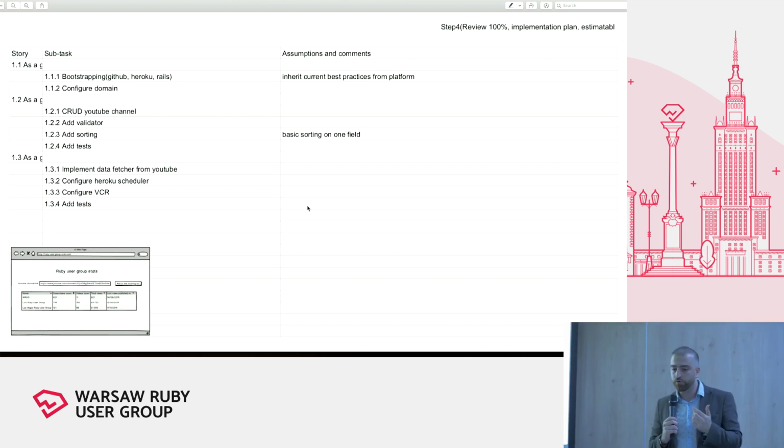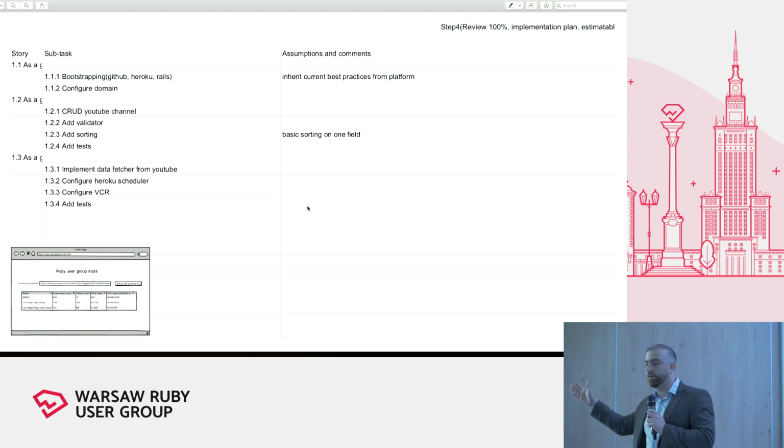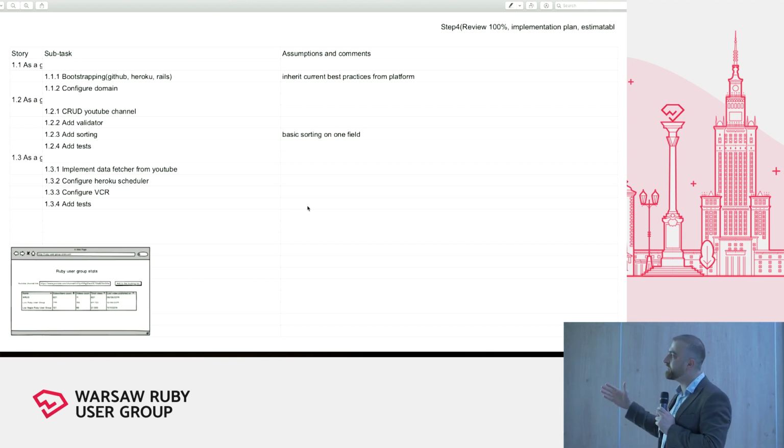And here you need to ask a question to yourself, are all tasks in here? Are there any other tasks that you're thinking of, but weren't included in here? This is the 100% rule from work breakdown structure. If you have such tasks, just create more tasks and under that create subtasks. So yeah, I simulated, everything is well, no more tasks need to be added. It acts as an implementation plan for me.